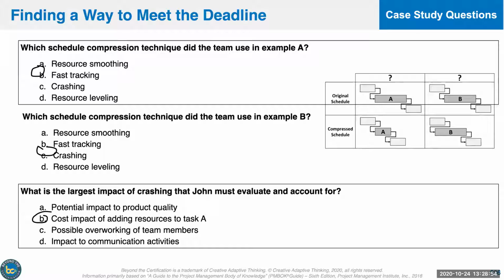Because crashing could incur more cost to the project. But it doesn't increase your risk. Crashing increases your cost. It doesn't increase your risk. Good. Yes. Good. Okay.